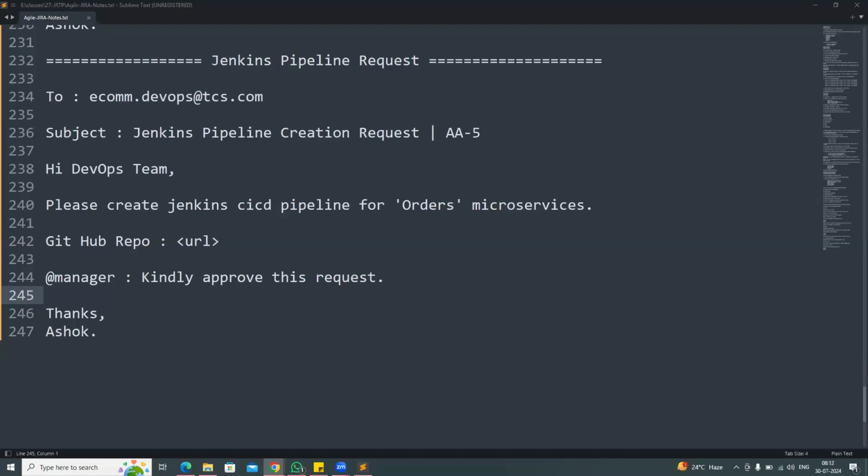So all these stories are independent by themselves? I mean, there are no dependencies between the stories? Sometimes there will be some dependency also. When there is a dependency, you need to hold on to that and take the next story. Dependencies will also be there when we go for the stories.